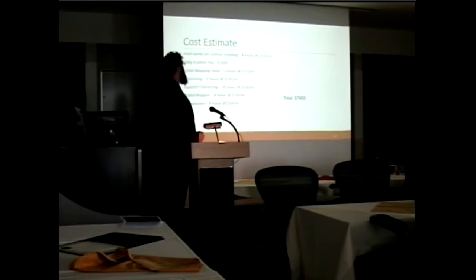The field was 8 hours. We kind of put this in here as what Fishback uses, $1,000 per day for the scanner. And then we have 3 hours to drive it, 3 hours to process it, 30 hours to extract the topo dot, and then 8 hours for the comparison, which brings it to just under 75 hours for our project.